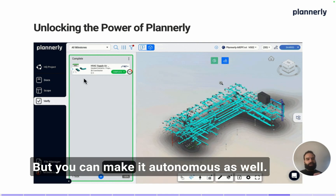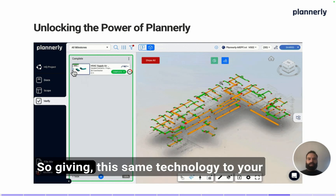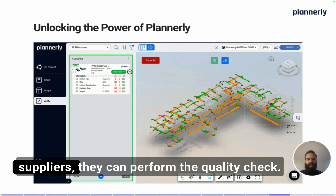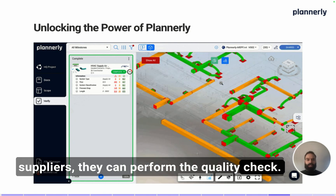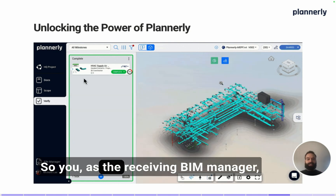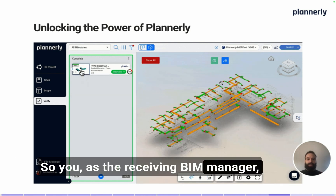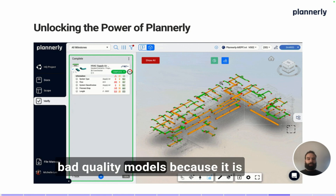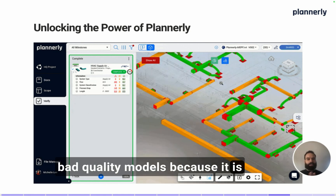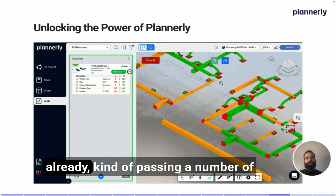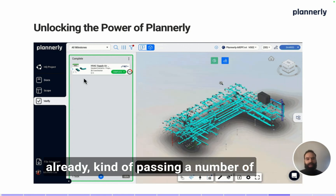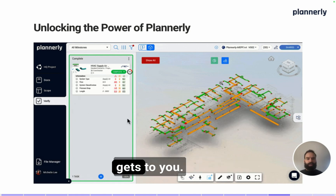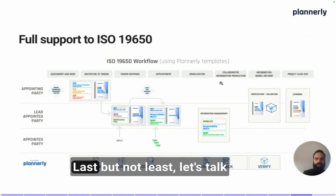You can make it autonomous as well. By giving this same technology to your suppliers, they can perform the quality check themselves. So you, as the receiving BIM manager, wouldn't even have to worry about bad quality models, because they are already passing a number of automated checks before the model gets to you.